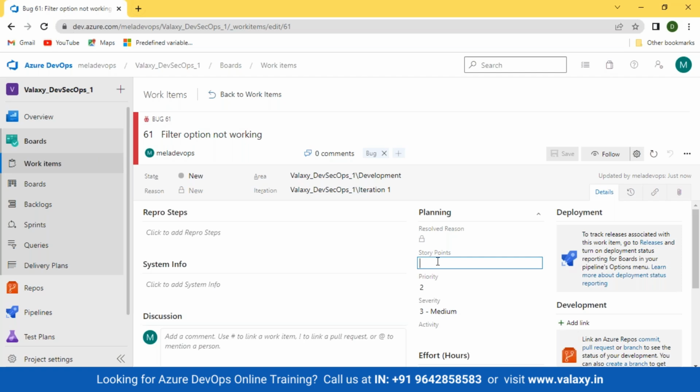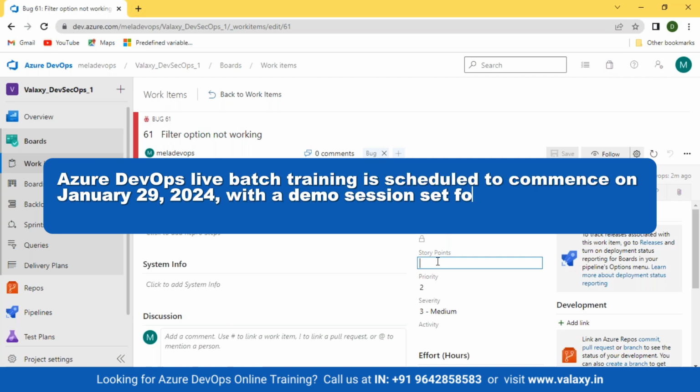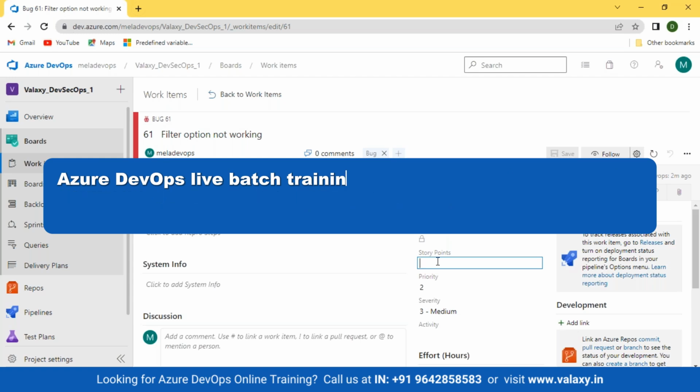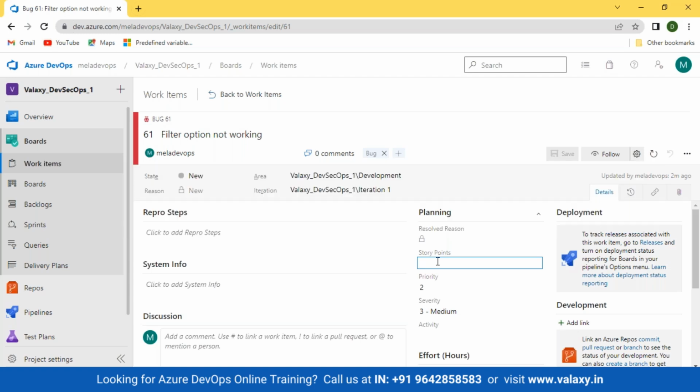Now two bugs cannot have the same story point, guys. Understand this. One bug is very simple. You just need to go and replace the package with the updated package and run your application again. The other bug is something where the package is already depreciated and there are backdoor entries which got opened, and it needs multiple fixes, and it has impacted multiple modules. Now just see the difference between the two bugs. One bug takes very little effort and you will be able to fix it very quickly. The other bug has more complexity, so the effort will differ.